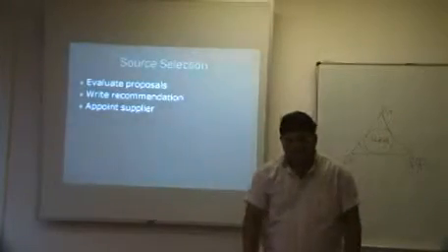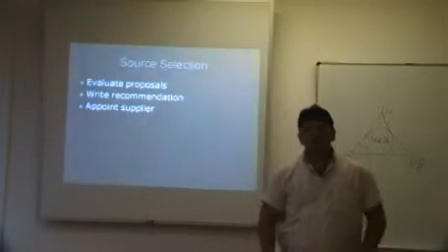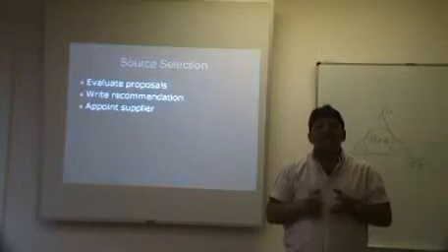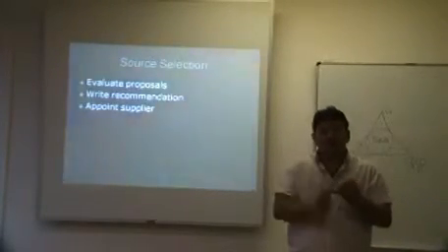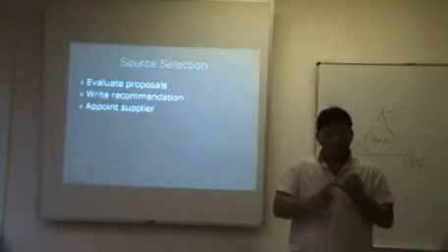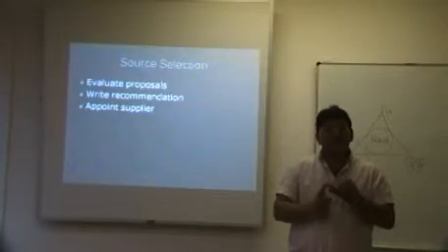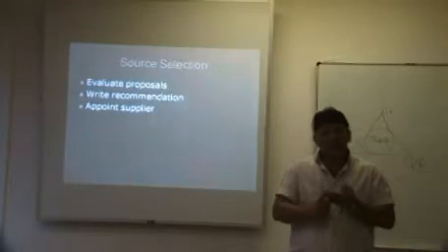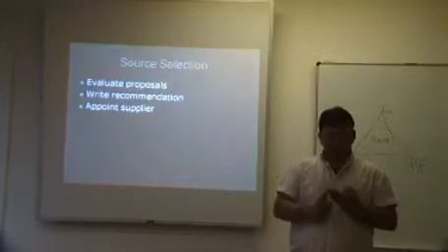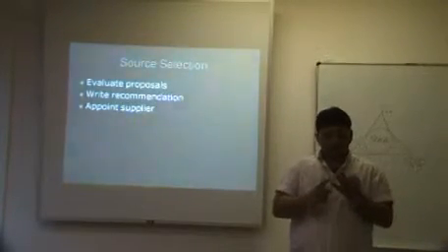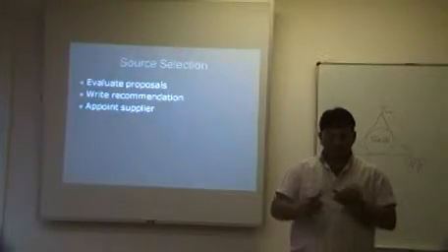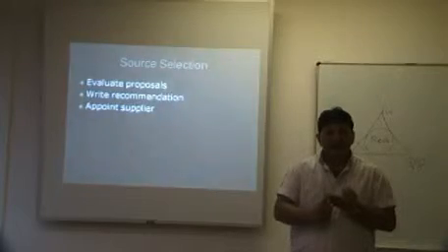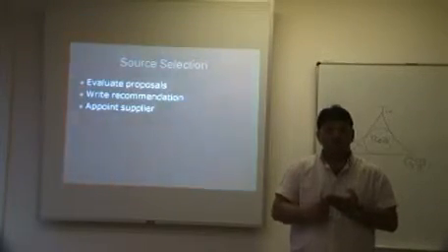And that evaluation is based upon predetermined criteria. And if I say predetermined criteria, one of them, as I mentioned earlier on, might be price, the other one experience, the other one track record. In an information technology project, it might be product functionality, architecture, research and development, and also price.